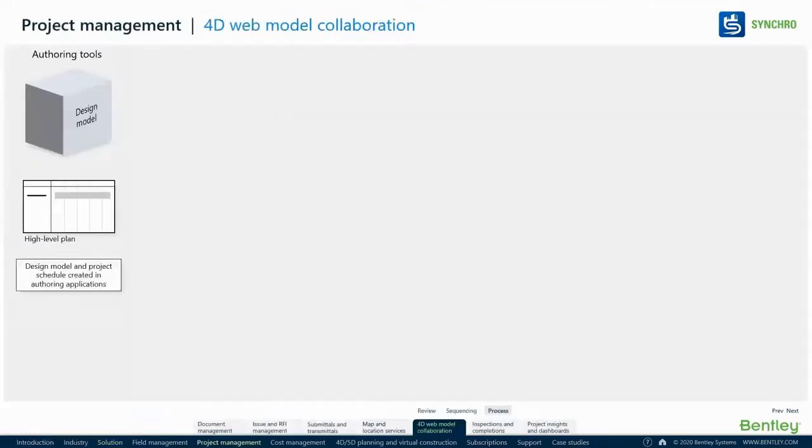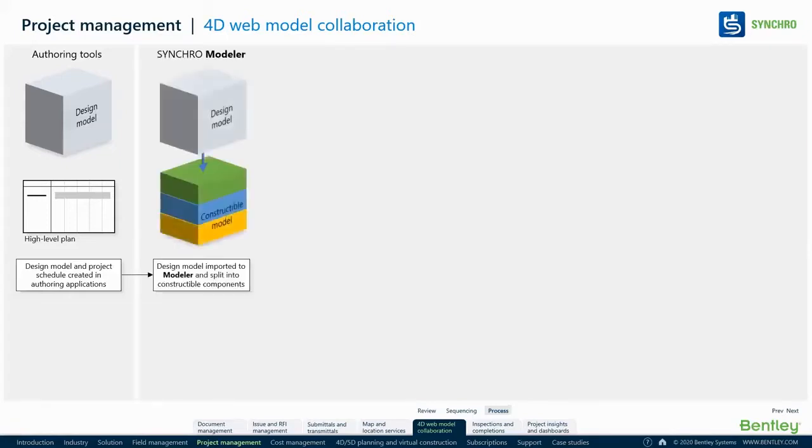So what is the workflow in this? Initially, for the planning stage, we have an authoring tool. It might be Bentley, it might be Autodesk Revit, it might be Tekla, Trimble Tekla. With that authoring tool, we do a high-level plan in the initial stages, because there are a lot of uncertainties in the project, but you wanted to go for funding, or you wanted to bid a project. So maybe you wanted to consider 2 to 5% plus minus, but you wanted to do a high-level plan and understand what resource optimization you can do on that model.